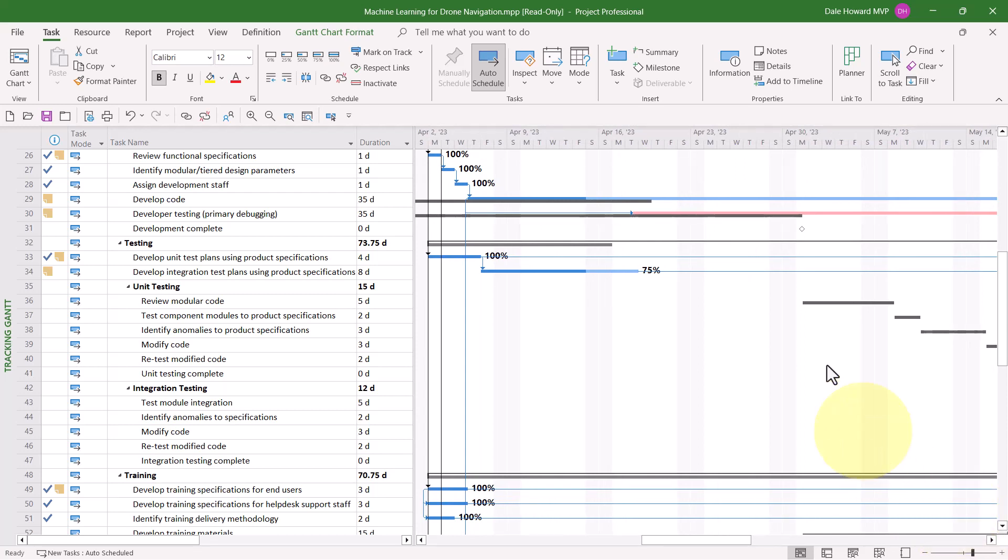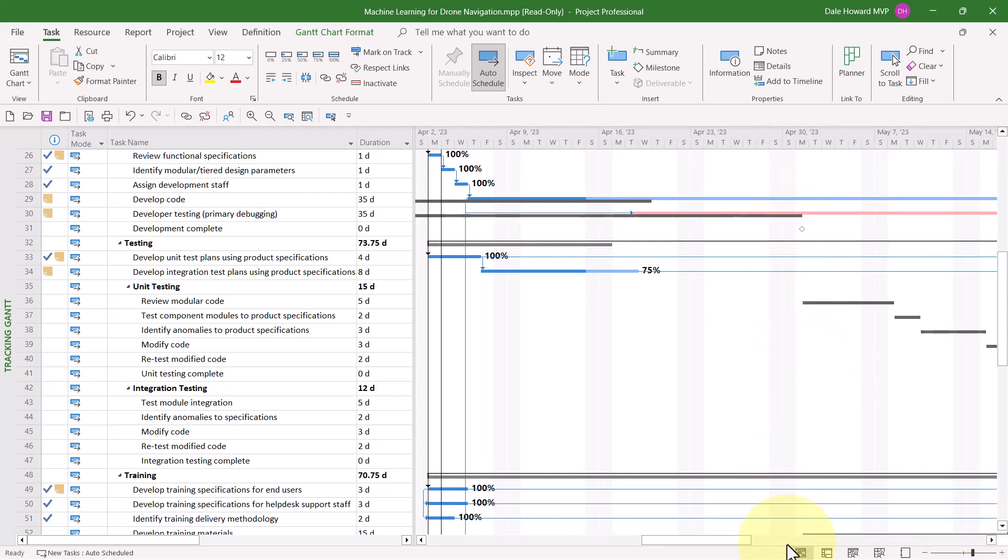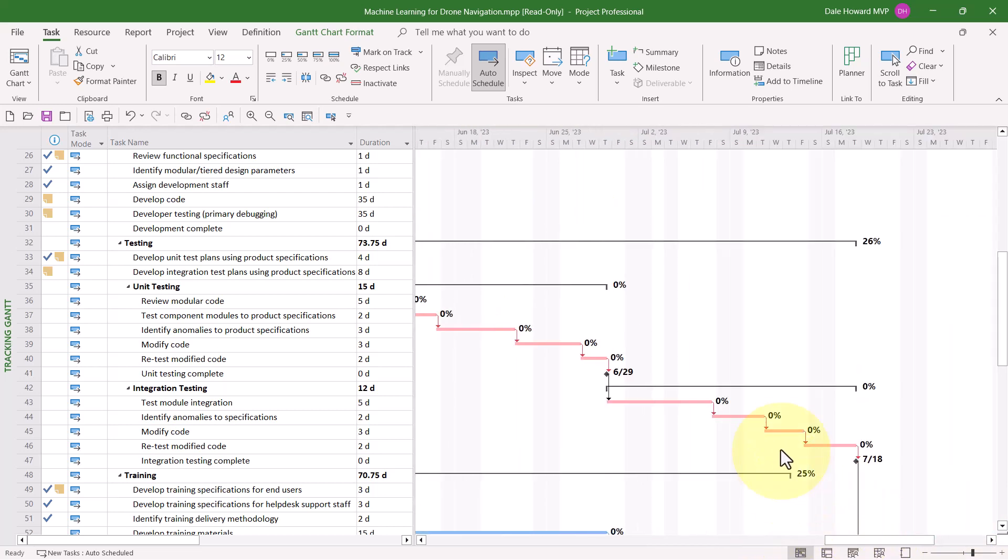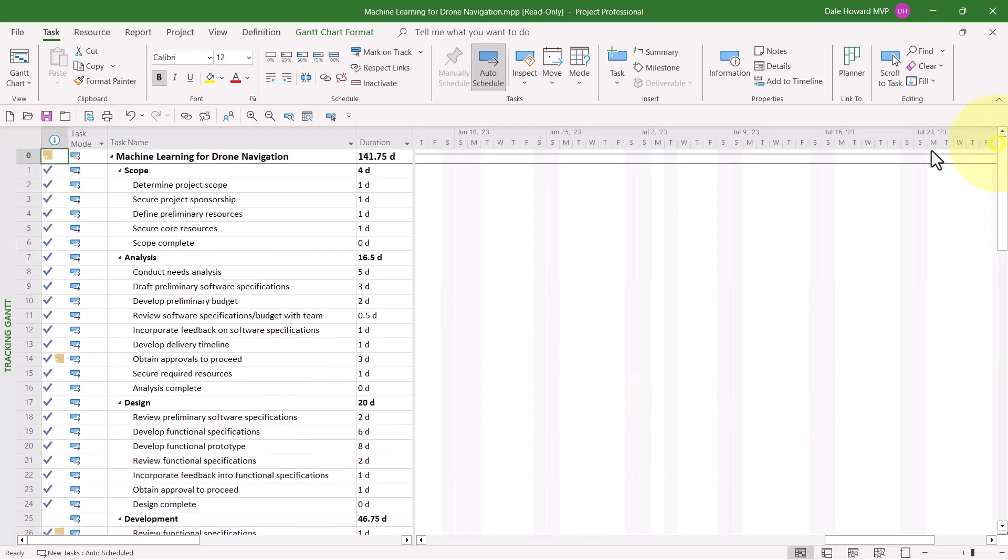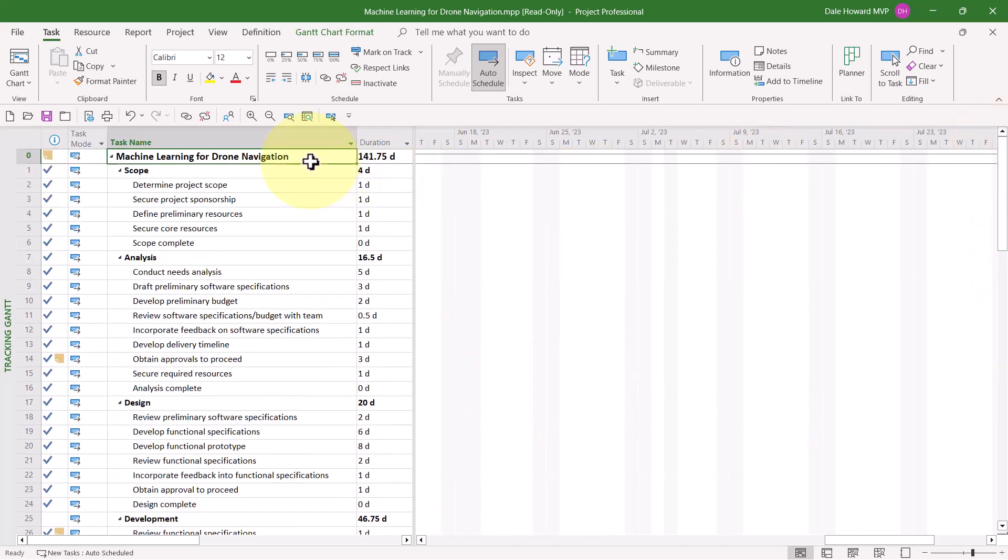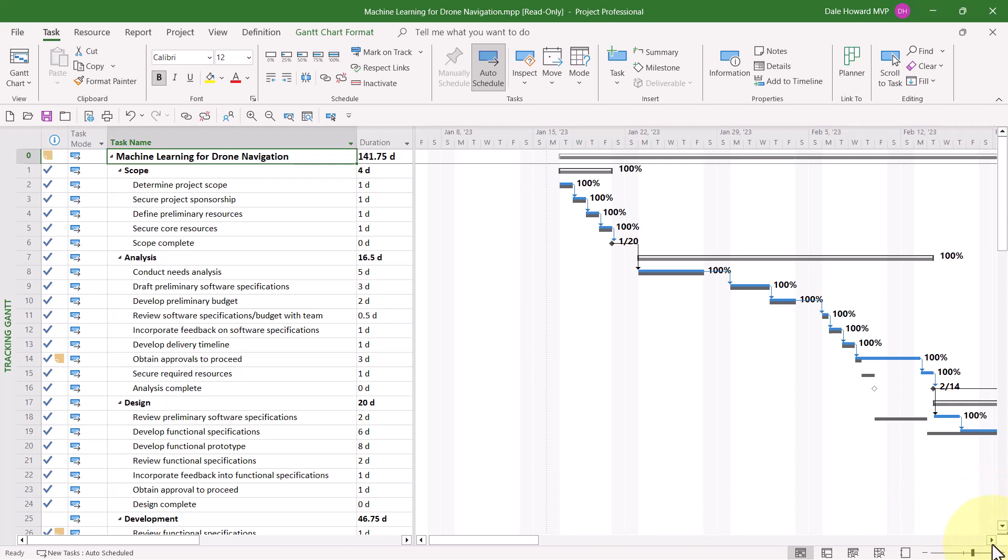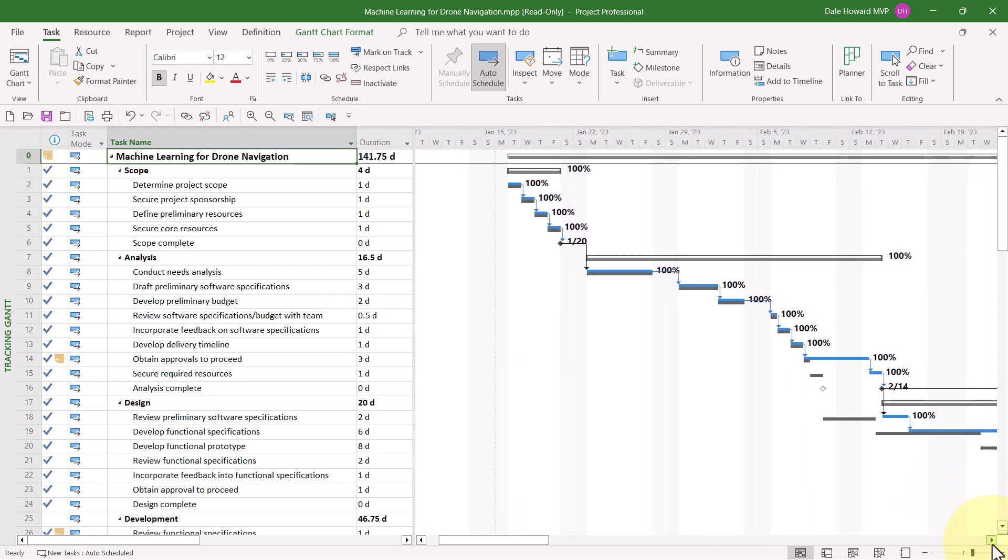You may also see red Gantt bars, such as I see here. Red Gantt bars represent critical tasks. Those are tasks that cannot slip without impacting the final finish date of the entire project. And then lastly, if you saved a baseline in your project, you'll also see gray Gantt bars. Gray Gantt bars represent the original baseline schedule in the project.